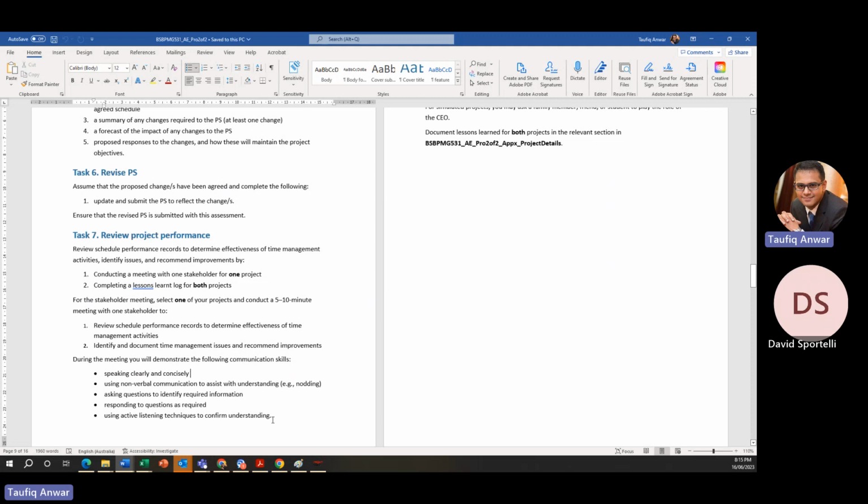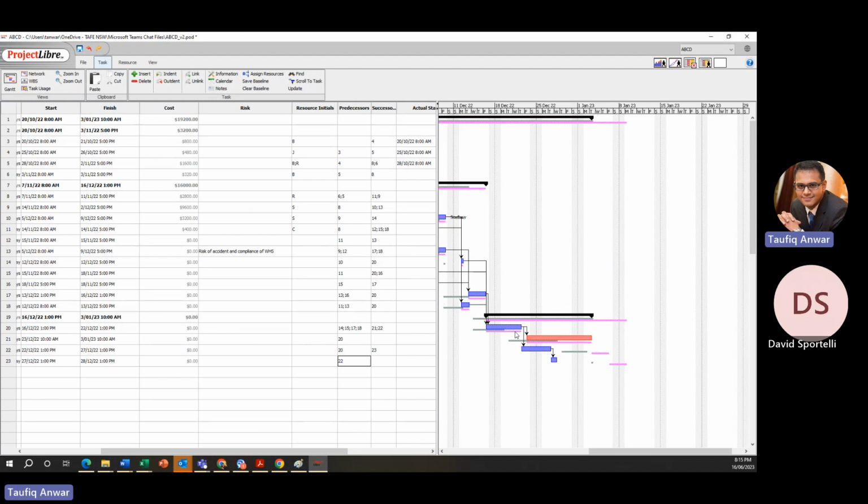In terms of time management, you're going to say we understood that sometimes things may not go right, but we have to look into a couple of tasks. For instance, in these cases, we checked how these two tasks are dependent. We felt that these tasks do not have very hard logic to go sequentially.